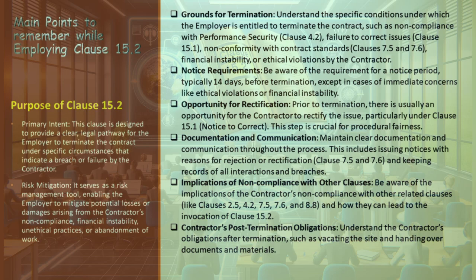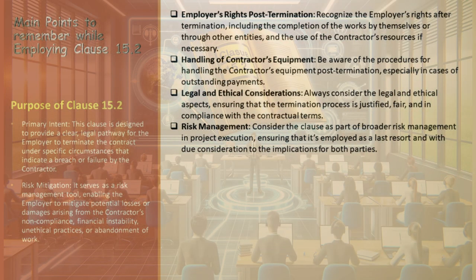Documentation and Communication: Keeping clear and thorough documentation and communication throughout the termination process is vital. This includes issuing detailed notices regarding reasons for rejection or required rectifications (Clauses 7.5 and 7.6) and maintaining records of all breaches and interactions. Implications of Non-Compliance with Other Clauses: Understanding how non-compliance with related clauses such as 2.5, 4.2, 7.5, 7.6, and 8.8 can lead to invoking Clause 15.2 is important for comprehensive contract management. Contractor's Post-Termination Obligations include vacating the site and handing over all relevant documents and materials. The employer's rights post-termination include completing the works independently or through other entities.